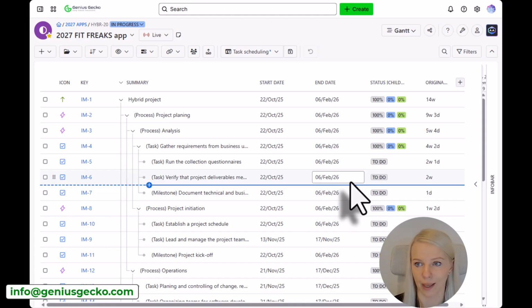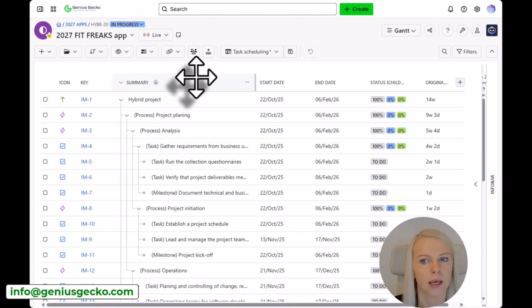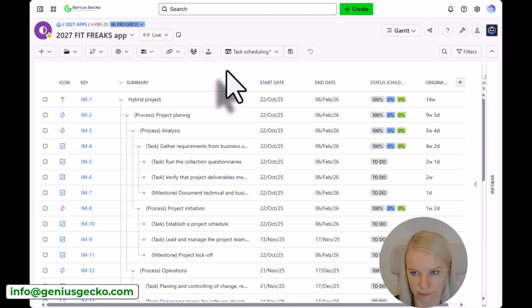And I have a plan. But here's the catch. BigPicture is calculating all that based on the data you put into Jira, right? Okay, you can use basic tasks that are not going to be connected with Jira, but that's a different scenario. Usually you are operating on Jira data and you are using those Jira elements, Jira work items. So, continuing this one, if your estimates are wrong, your resource plan is a fantasy.